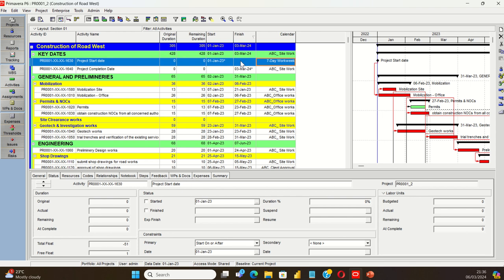But you need to do this very realistically, and it should make sense. If you have an activity for 20 days, you can't just bring it down to 1 day. You can't do that. You have to play with a number of activities, and it should make sense. You have to have a very realistic duration. It was 20 days before, but once you change it could be like 15 days. It doesn't really matter, because it doesn't affect your productivity much.